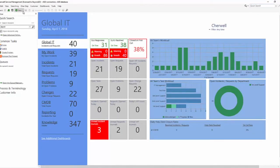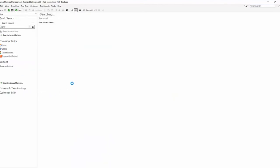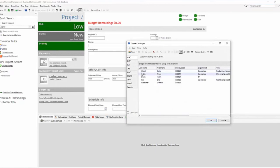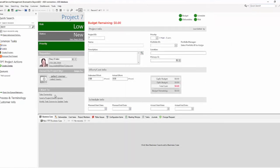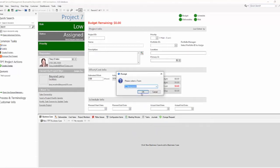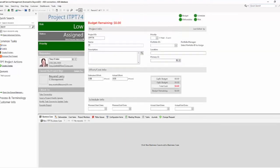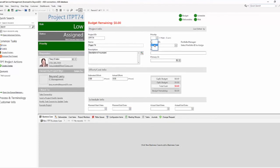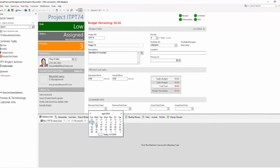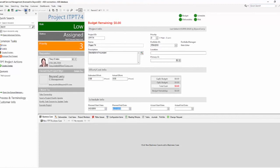Let's go ahead and create a new ITPT project. We're going to pick a requester. We'll make it Tracy. I'm going to take ownership and change my team to IT management. Really not relevant, but it's just for me. Project ID, we're going to call this ITPT 74. Project 74, description of my project. My priority is going to be three. My portfolio ID, I'm going to select one. Location is not required. Primary CI is not required. I'm going to put my planned start date as tomorrow and my planned end date at the end of the month. We'll go ahead and save the record.